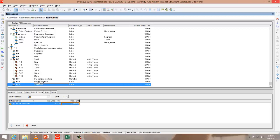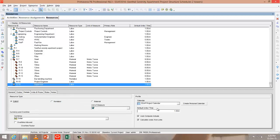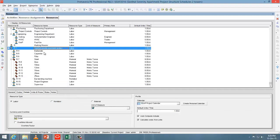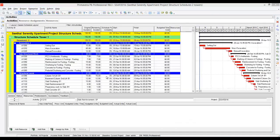The major thing is for every resource, you have to check the calendar. Because if it follows a different calendar, there will be a conflict while you schedule the project. Next, let's see how we assign these resources to the activity.